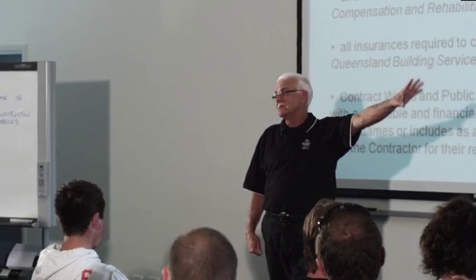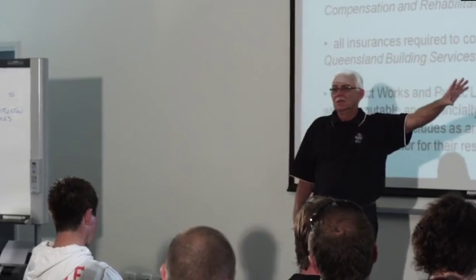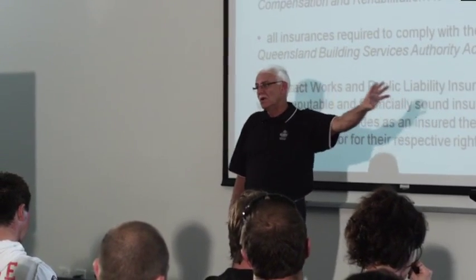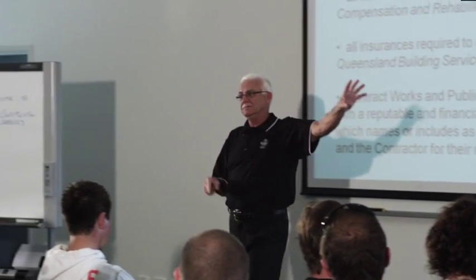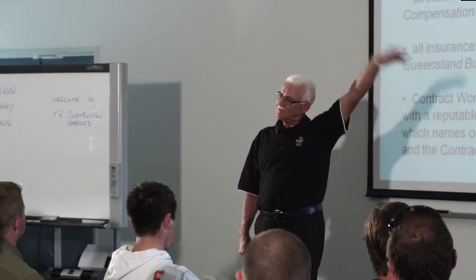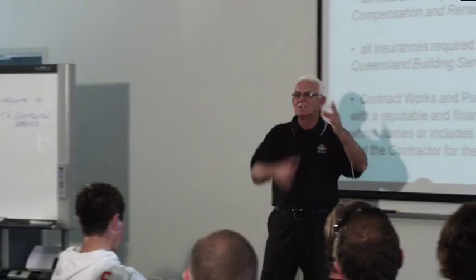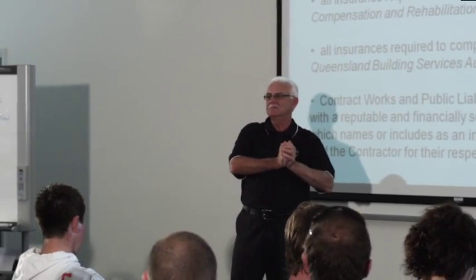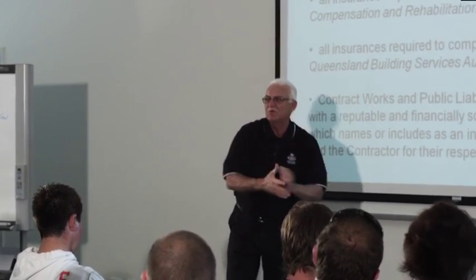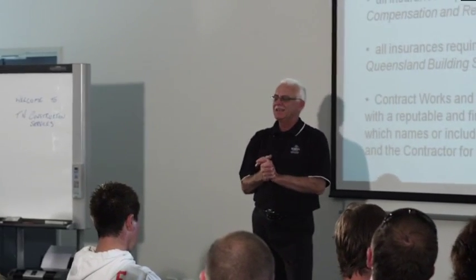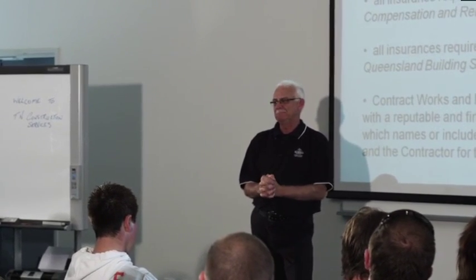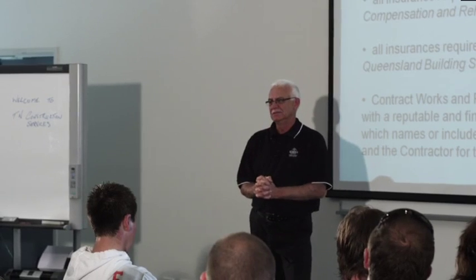Some of you guys might do BSA insurance work. It costs a lot more than what it would if you were going to do it to fix it, because insurance, yeah, you get good money for doing insurance work. So the BSA will go out and get the work done. They will pay for it under the insurance scheme. And guess who they're going to chase to recover their money? Because it's a defect.